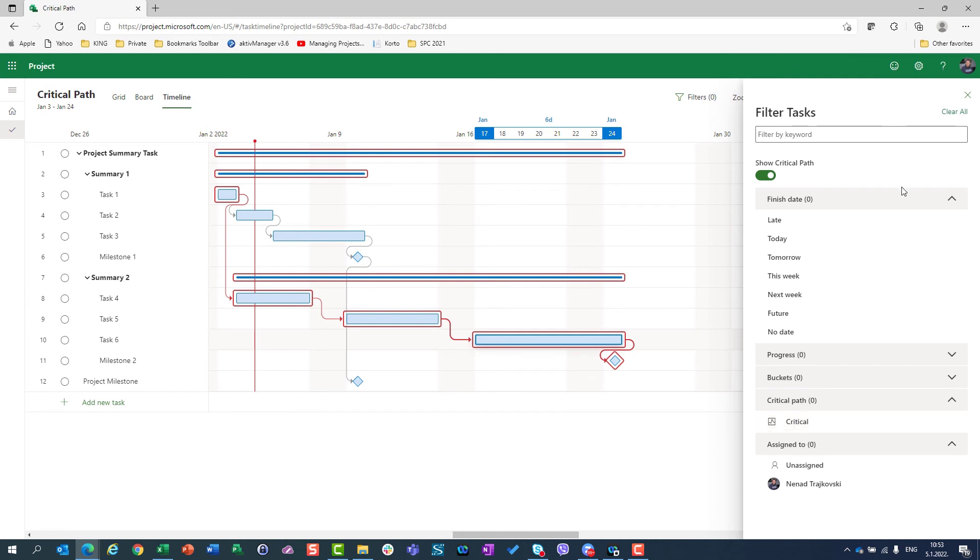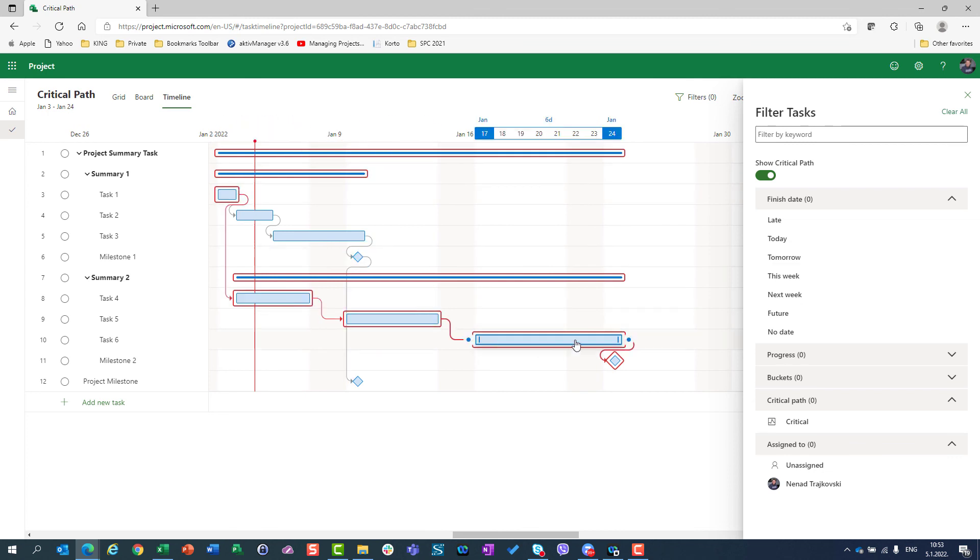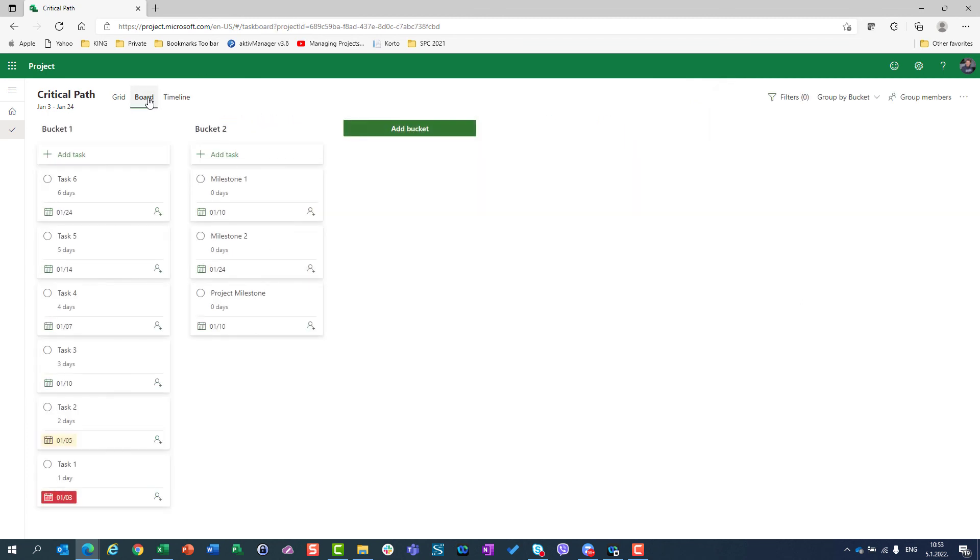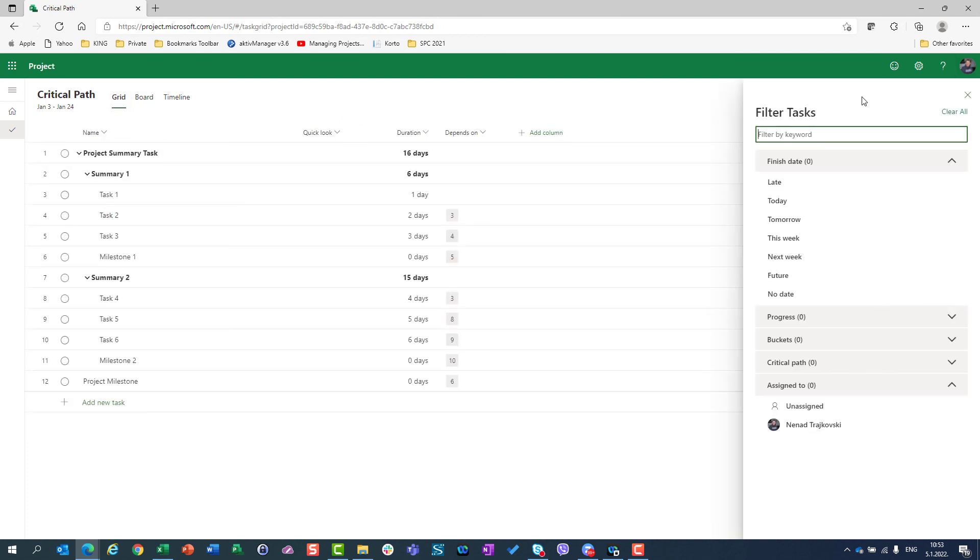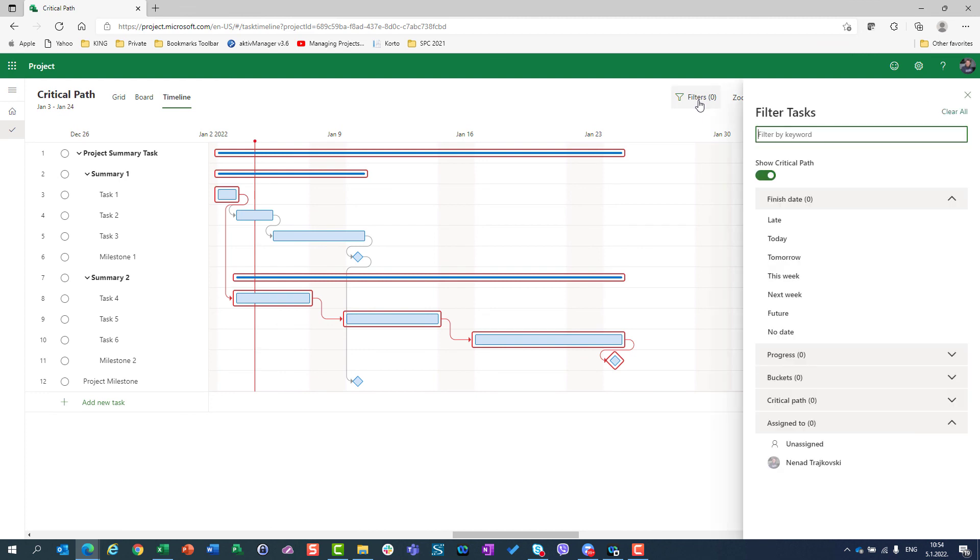So I will turn it off and I will see all tasks, but tasks which are on Critical Path are marked in red. Be aware that if you go to Board or Grid, you don't have this possibility which is Show Critical Path like you can choose here in Timeline.